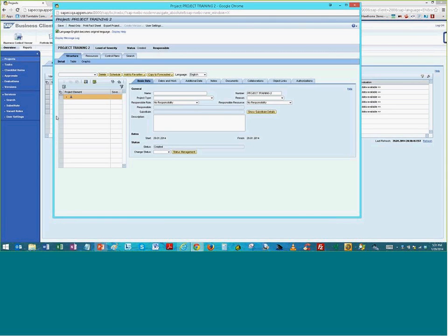So now we're in a different project. Nothing else is in there. I'm going to call this King 2. No phases. Again, see that's blank. The dot here is blank. I can't create a phase because I haven't associated the project type at this point. I'm going to create this project type now, the phase populates, and I can now create a phase.